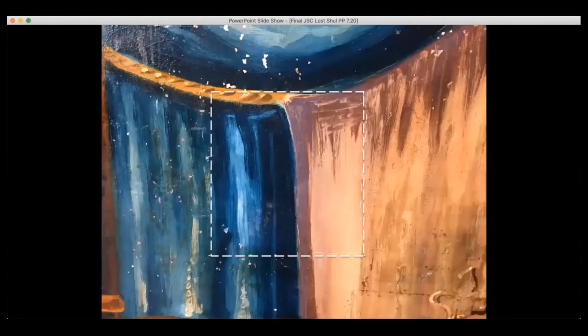The time required to clean, fill, and in-paint representative areas of loss was quantified to inform a time and cost estimate for the final stage of conservation treatment to include restoration of areas of missing color and design. Timed cleaning tests indicate that it will require an average of 5 hours to completely clean 1 square foot of painted surface. This adds up to 775 hours, or about 26 weeks, to finish cleaning the 155 square foot mural.